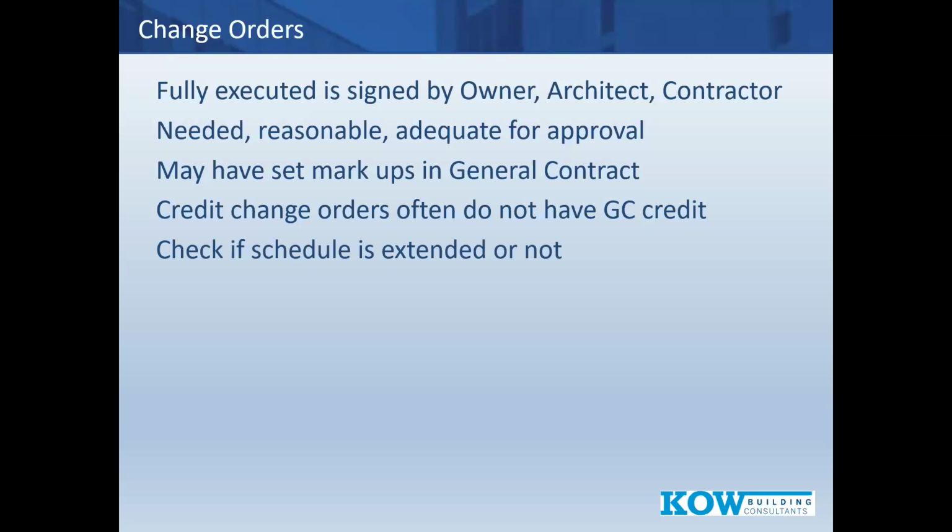No, you have 10 more months in the project. And they say, yeah, if we pull the trigger on this generator, we could have it bought, shipped here, installed, wired, everything within a month and a half. That's not going to extend the schedule. So we want to see, is it going to extend the schedule? Most often it's not, but sometimes change orders do.